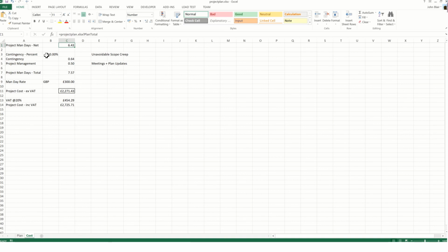So again, you'll decide. I use 10% typically, but you'll decide what is relevant based on your relationship with the client. So the contingency is converted to man days.